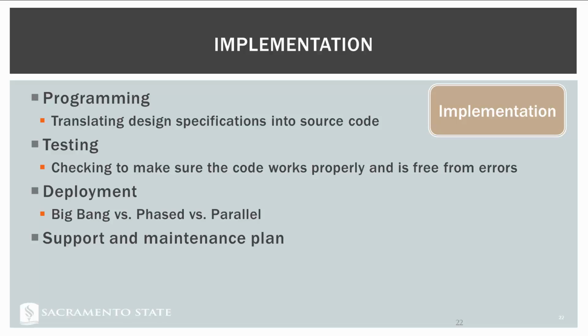But we also have duplication of work. What if we need to put data into the old system and the new system in order to make them work? What if they don't have the same data store for whatever reason? That can cause a lot of inefficiency and some problems. But it's less risky. If the new system isn't working, then, well, the old system can still be used. What's most common probably is the phased approach.